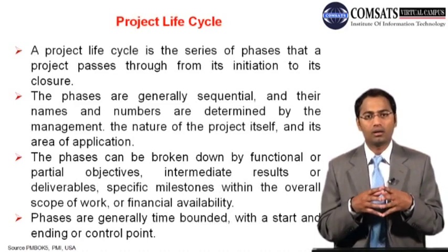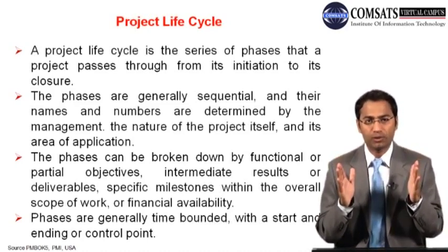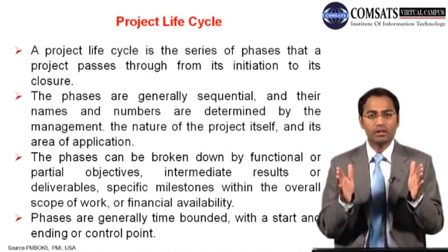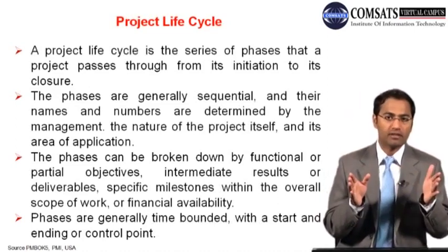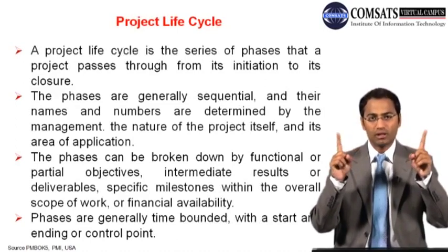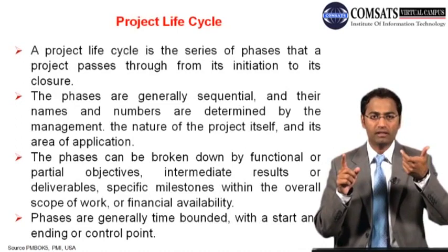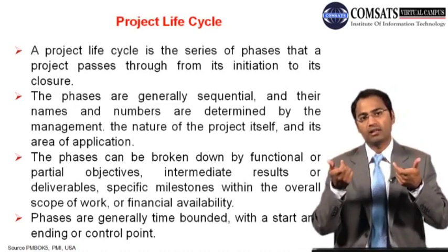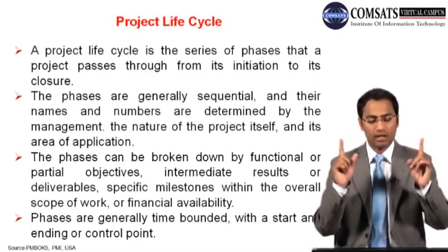So product life cycle is different than project life cycle. Remember that this is a very important concept. People usually do get confused with project life cycle and product life cycle. Now, the product life cycle is total umbrella under which we have project life cycle, a part of it, and then operations life cycle, and then disposal. So three different components make product life cycle.